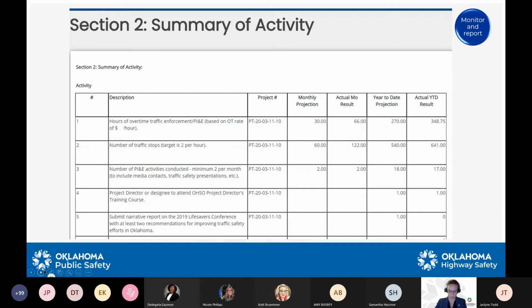Now let's add to the picture and hypothetically say this report is from June. Things start to look different with a full quarter of activity pending in our 80% spending scenario. Worse yet, what if this report was late and wasn't received until September, and almost 3 months of activity haven't even been considered, but there's only 2 weeks left in the fiscal year? As everybody can imagine, that could pose a big problem for all of us to figure out what we need to do to get everything right in line again.